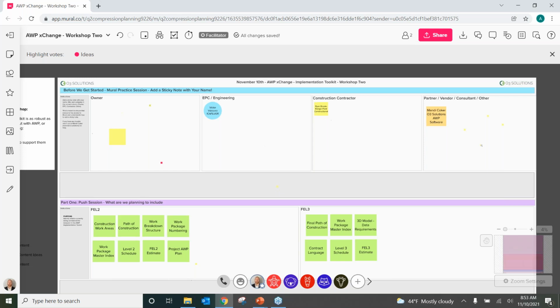From an AWP specific standpoint, it's a question of understanding what went well and what went badly for you. The beauty of AWP is there is no absolute set defined requirement. To give you an example, the industry standard for IWPs is that they should be between 500 and 1,000 hours, because that was the methodology that came out of Canada when it was first invented, based on a 10-day working shift. For a single crew, that represented between 500 and 1,000 hours.